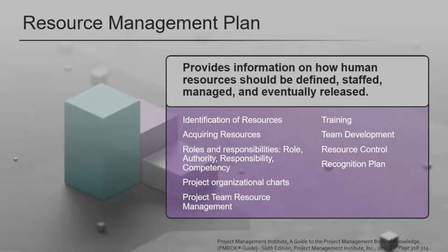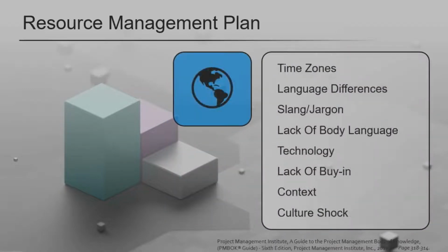So the resource management plan, even though not heavily tested on, is the first one out of the gate that they threw out there. You'll see a ton of them. But just remember, once everybody's like, yep, that's how we're doing resource management, it gets locked down and has to go through change control to be updated.